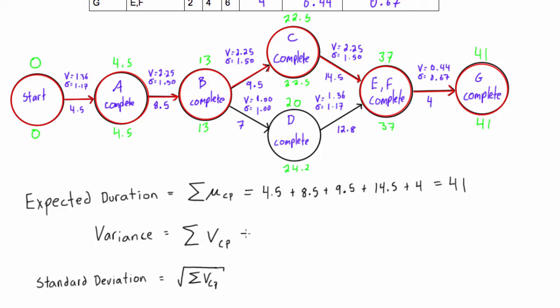Same thing goes for the variance. We want to sum up the variance for each activity along the critical path. So we have 1.36 plus 2.25 plus 2.25 plus 2.25 plus 0.44, and that gives us the value of 8.55 for the variance of the entire project.